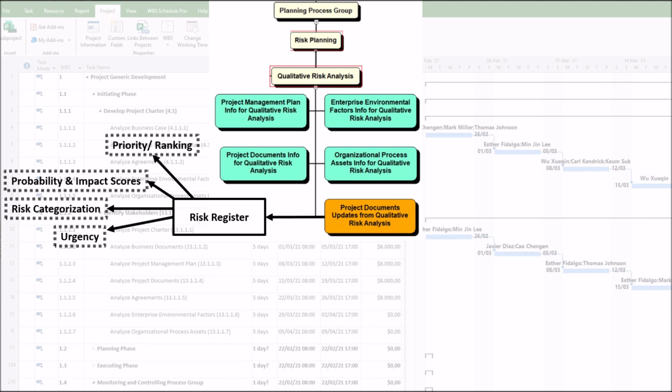Let's take a break from the studies to explain how urgency assessment is implemented, the importance of the urgency matrix and its project phase. How urgency assessment is implemented. First, determine risk proximity. Estimate the time window until each risk could materialize, such as days, weeks, or months.